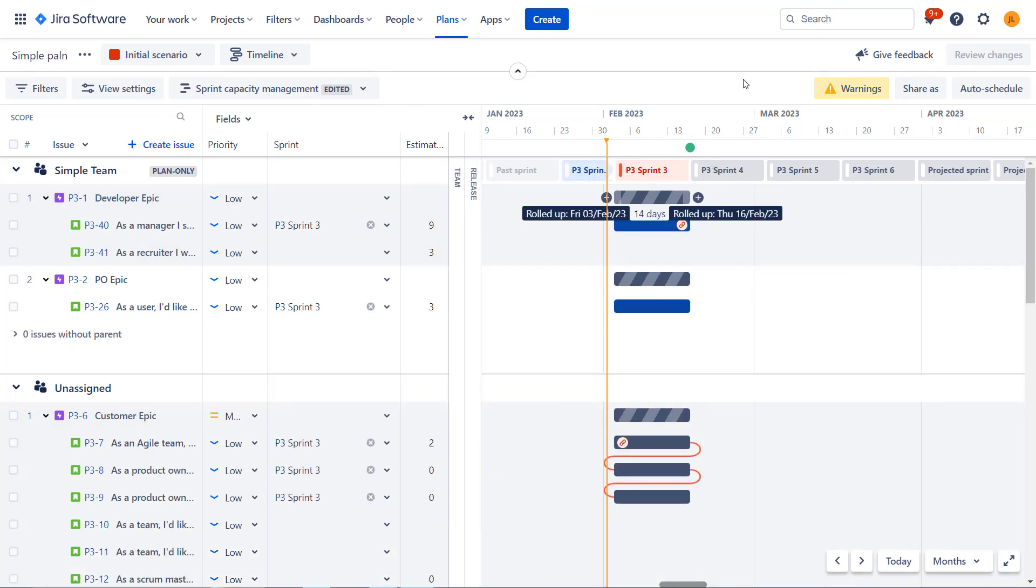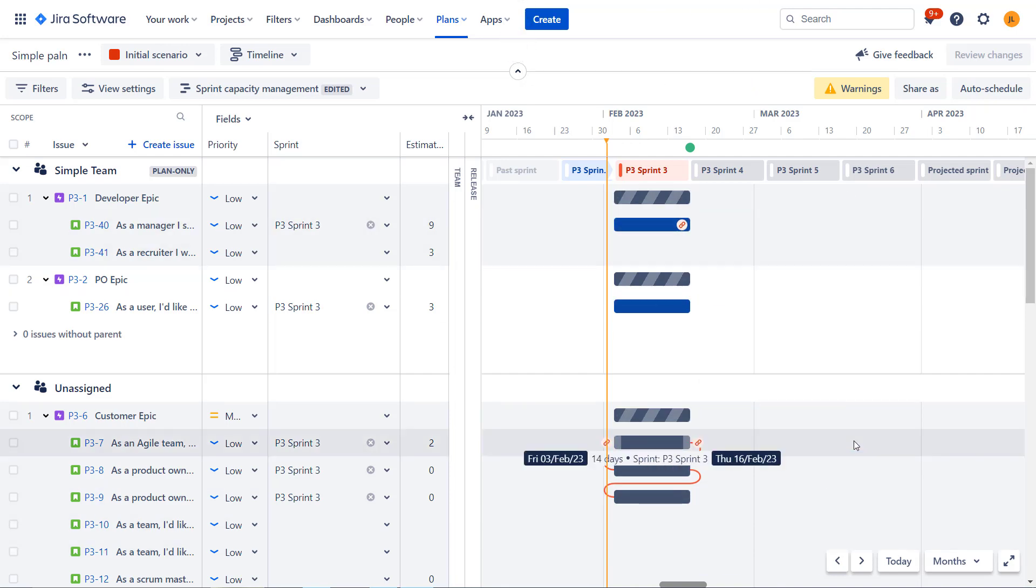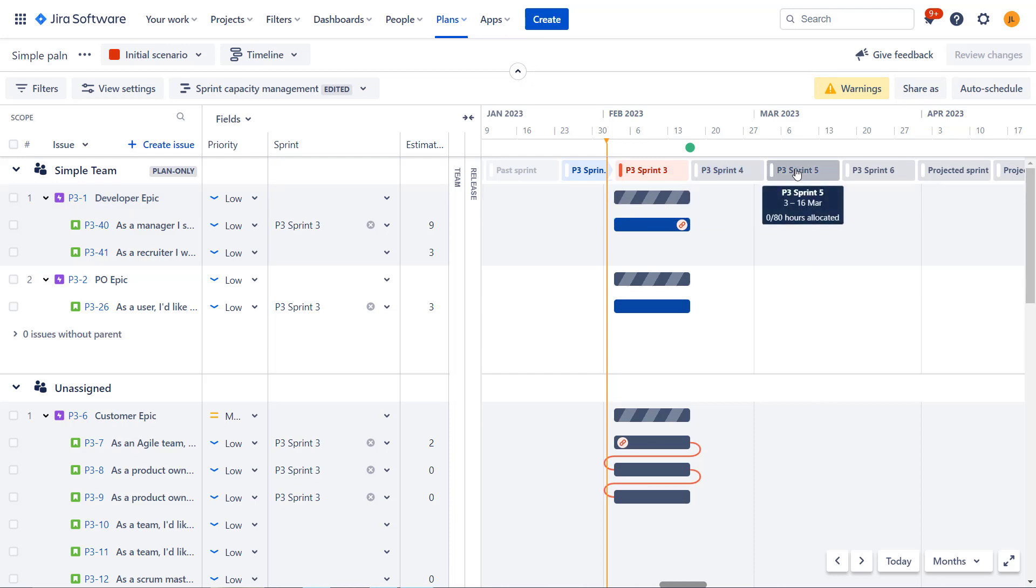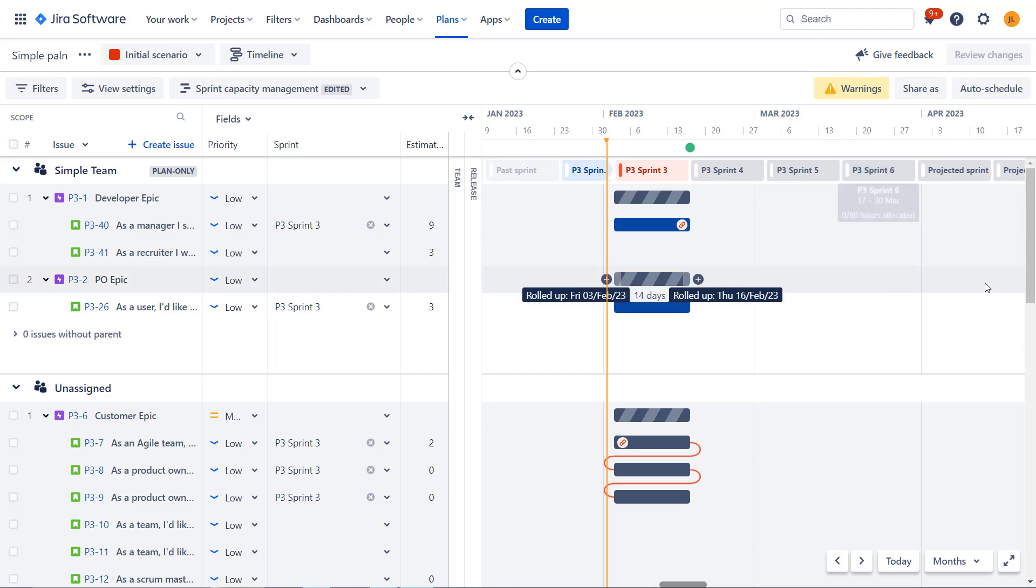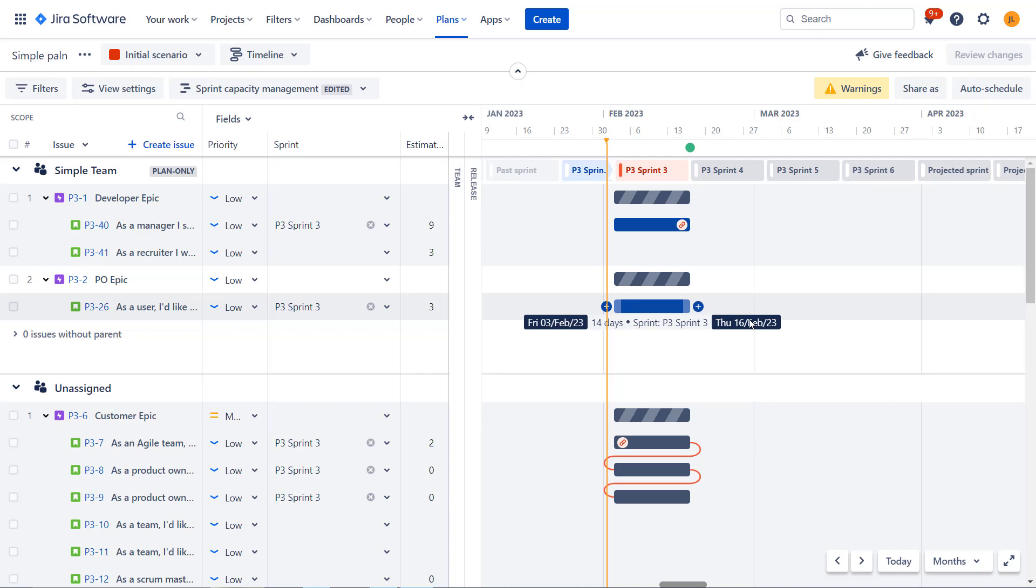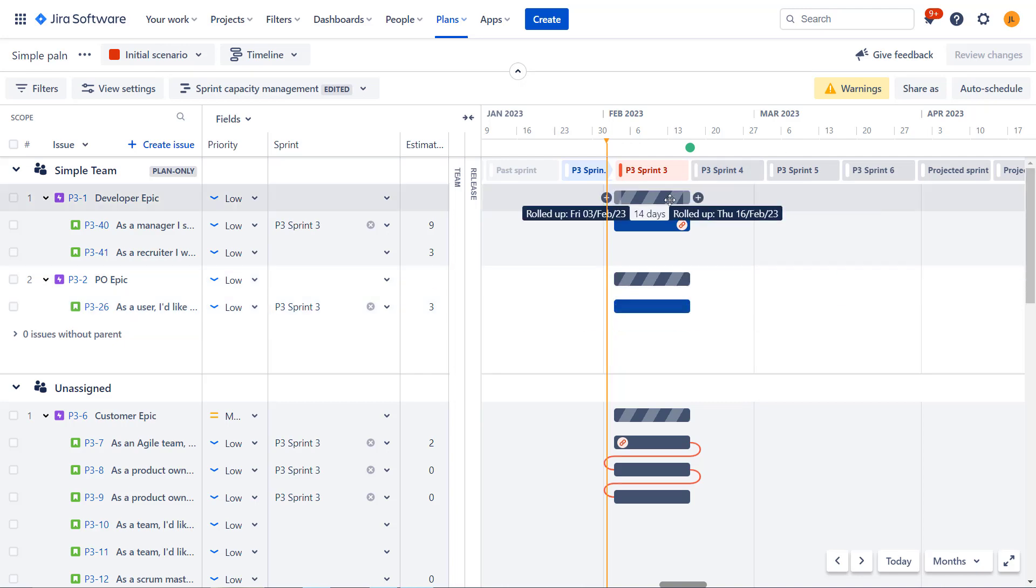So you can already see that for agile, it actually is a pretty useful feature. So if you have very long backlog of issues and you want to see more or less when on the timeline you will be done with them, this auto schedule can do the work for you. So it will schedule issues for the sprints, minding what is the capacity of the sprint or velocity of the team in each sprint. And you will see how on the time it looks like. Of course, you do not have to commit to this. So for the sprints that are five months in the future, it's not something you will commit to right now, but you can get an overview. And when you get closer to the start of a sprint, you will review the content proposed by the auto schedule feature and do some minor tweaks. But the bulk of the work will be done for you. So this is in my view where this feature shines. So for agile is great.